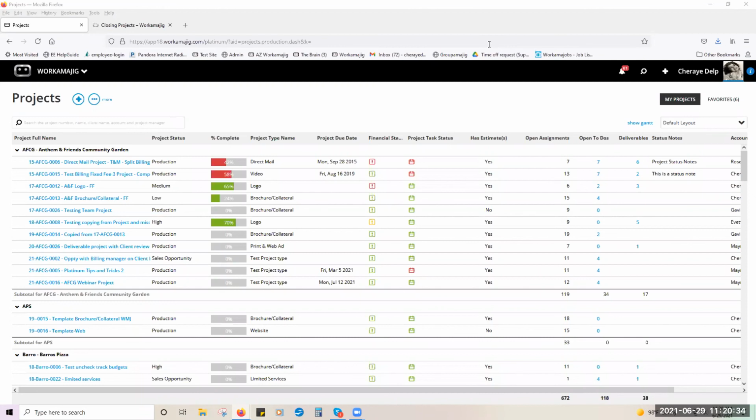So what you would do is, no, you wouldn't want to click it every time. You only want to use it the one time. Typically, if you're working in a schedule and something changes or you add people to the task, let's say you added a new graphic designer and you added another 5 hours, and then you went to another task and removed hours. When you click the change order, the system is smart enough to look at the approved estimate that's already there, and it notices the changes, and it pulls in all of the changes that you made in your schedule. So the system will do it all for you, whether it was a positive or a negative.